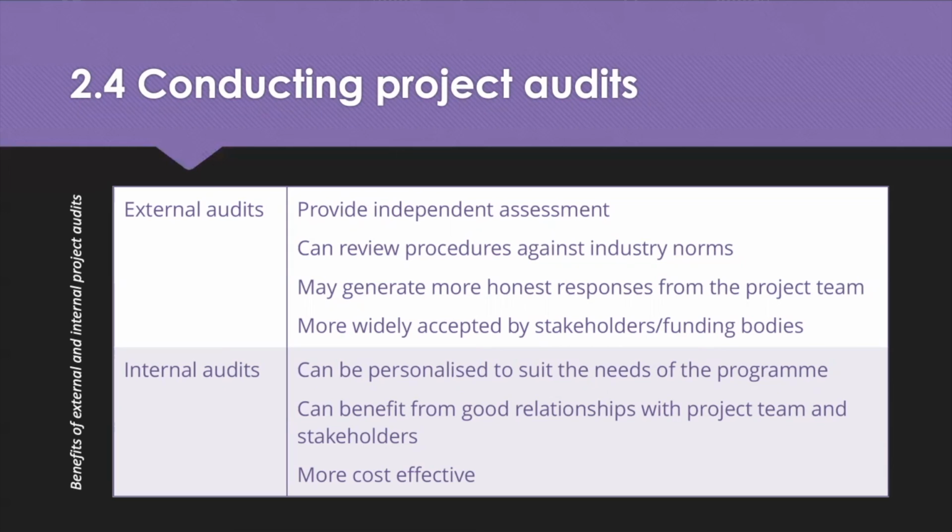This is used in the public sector and anything of high financial value. It verifies that all project costs invoiced were specifically for the benefit of the project. It can be carried out by externals or internals. Externally would provide a very independent assessment, whereas an internal audit will probably be done with the project manager. But if the project is large or of high value, it is generally done by an external auditor, because they can generate a far more unbiased view of the situation.